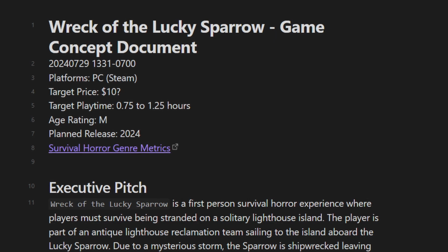One really valuable thing that you can do is to go back and compare that feature or that particular idea to what you had in your game design document. If you don't have a game design document, do yourself a favor, go write one. These things don't have to be massive tomes. They can be a single one-pager. But it really helps you to have all your ideas down, not only in the beginning to document those ideas, but so you can use that document later on to compare these things to, so that you can make decisions that help your game and don't waste your time.